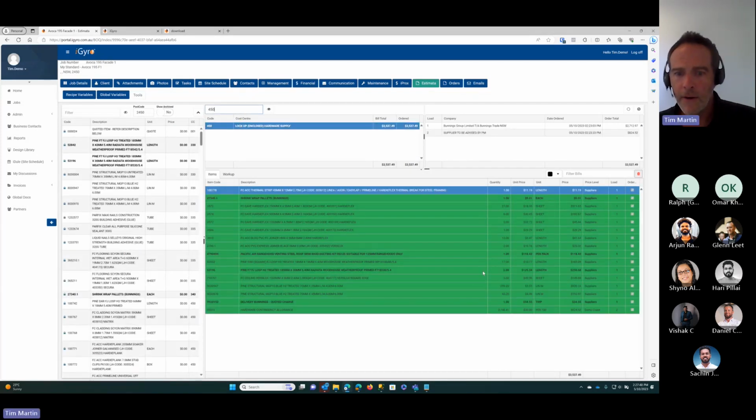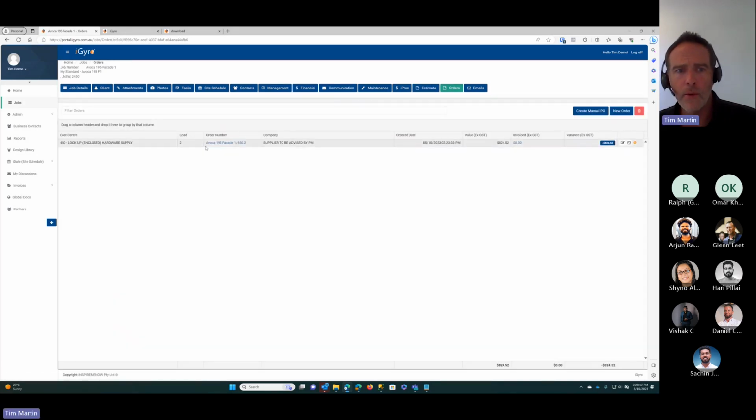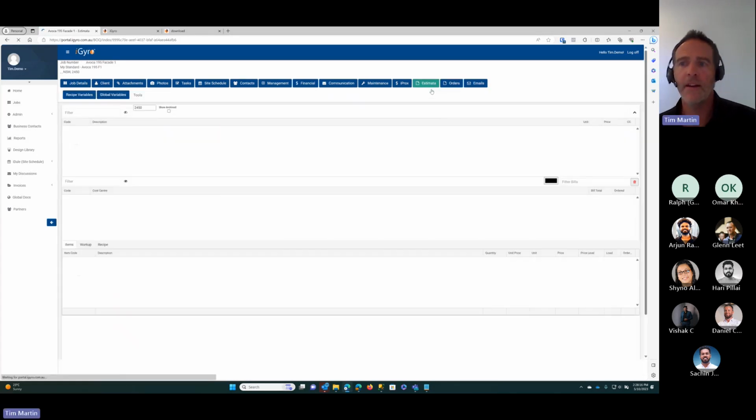All right, now if we need to change a purchase order, we would need to come back into Estimator here and unlog the order. So we'd come here and use the unlog option. Just unlog that. It's taking out the order date and all those tick boxes are unticked. But look back on the orders screen, that order has also disappeared from here as well. Essentially, we're recreating the order.